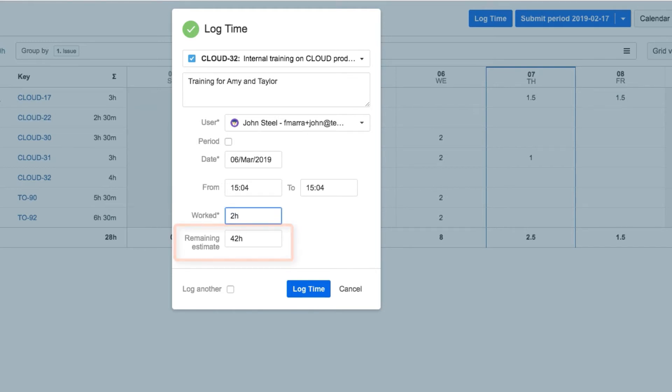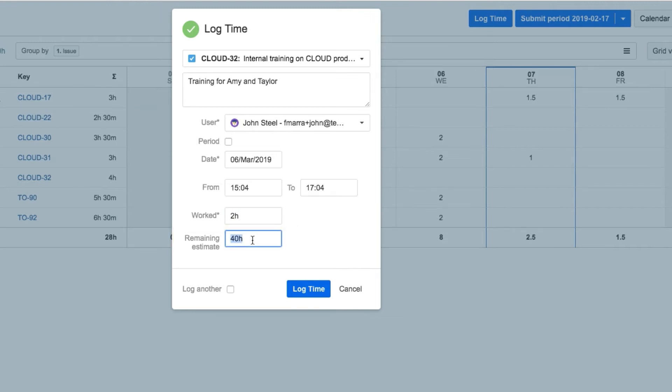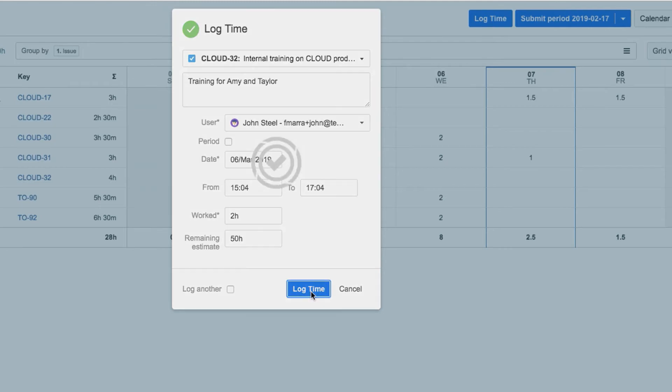The estimated hours remaining for this issue are automatically updated after John enters his worked hours, but he can also edit them here. If John wanted to keep this dialog open to log time to another issue, he could check Log Another here. But he's all done, so he clicks Log Time.